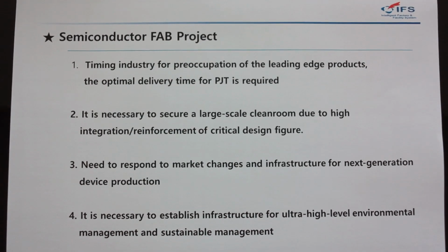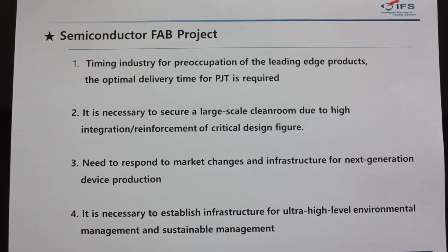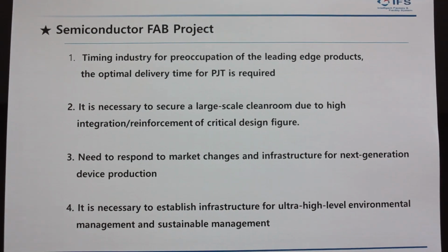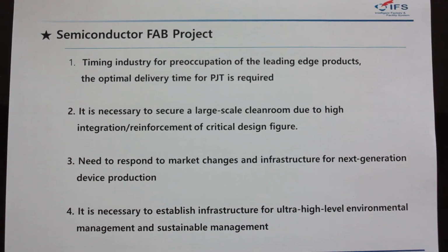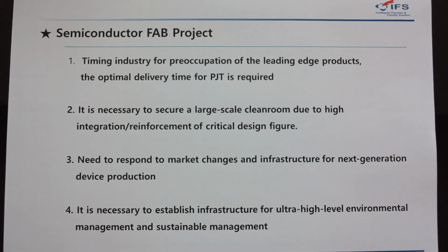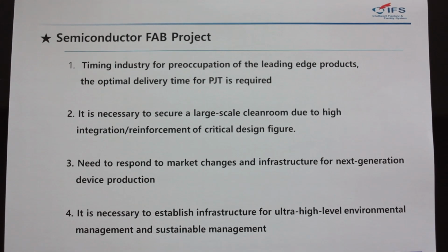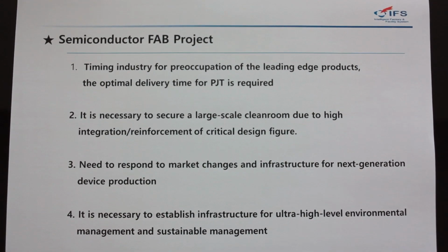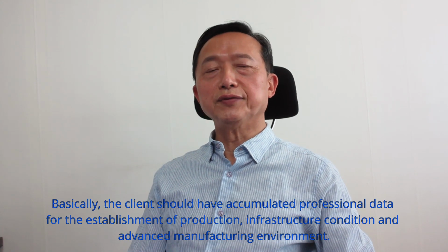Based on this kind of information, the designer makes drawings of various fields so that they can have the basic framework for the factory construction to follow the user's requirement. In this step, many clients often rely on the design company excessively. As a result, there are many cases where the shape of the factories after completion is insufficient or has unexpected losses during normal operation.